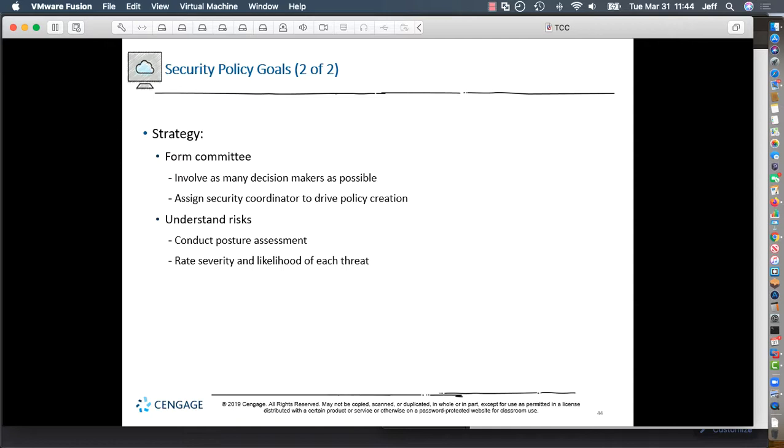So the one that may almost never happen, you may just mitigate with insurance or something, whereas the one that's moderate, that's likely to happen, you may want to take some action and buy some devices or implement a solution or create a solution to prevent that from happening, because it's more likely to happen and, in the end, going to cost you more than the one where each incident is big but rarely happens, or may never happen, versus the one that is almost guaranteed to happen, right?